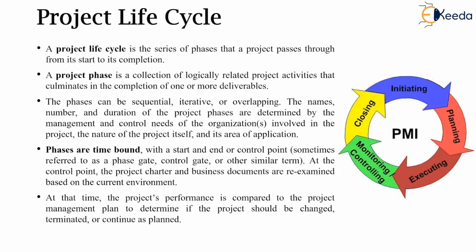So, a project phase can be said to be time bound. It will have itself a perfect start and an end date or various control points within it. Only after a phase gate or a control gate is crossed through various checks, etc., that the project enters into the next phase. At such check gates, the entire project charter, the business documents, the feasibility of the project, etc., is re-examined as to the current environment.